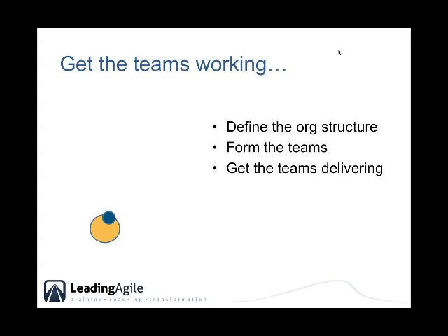So right out of the gate, before we have a fully formed backlog that's operating in this way, we want to get the team starting to establish a stable velocity. I've often joked that the one thing that separates Agile from total chaos sometimes is the fact that the teams make and meet commitments every 2 weeks. They deliver working software every 2 weeks, and there is a stable delivery cadence and hopefully a stable velocity, or maybe even an increasing velocity over time. So getting the teams working together, functioning as a unit, delivering, and to where we can measure them is a huge thing right out of the gate.